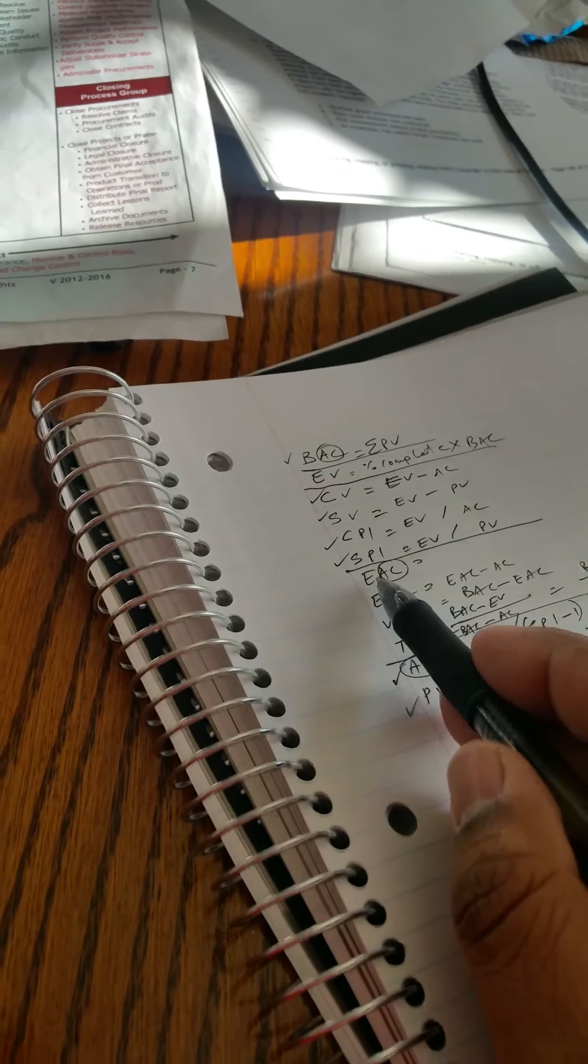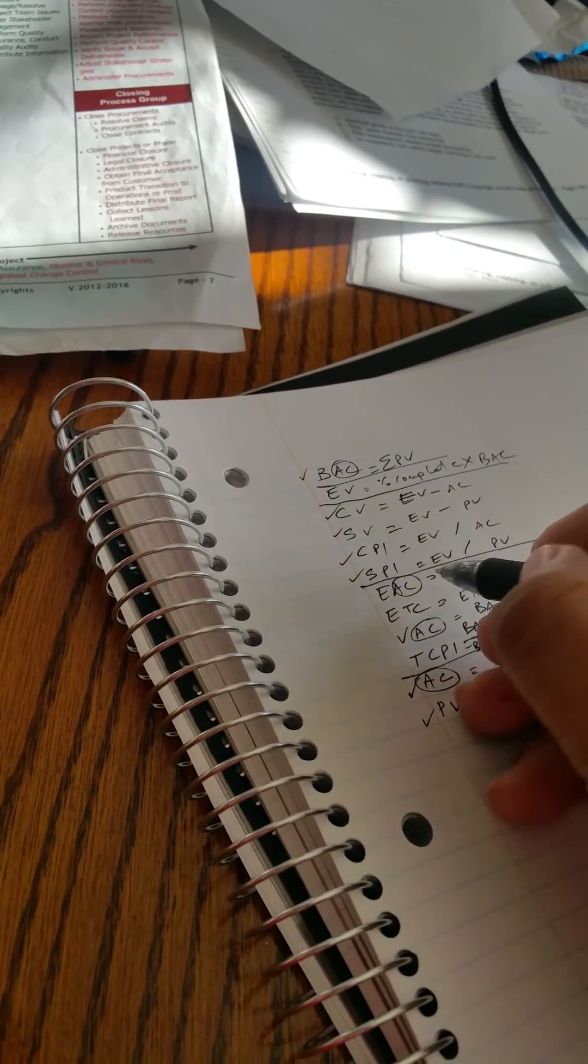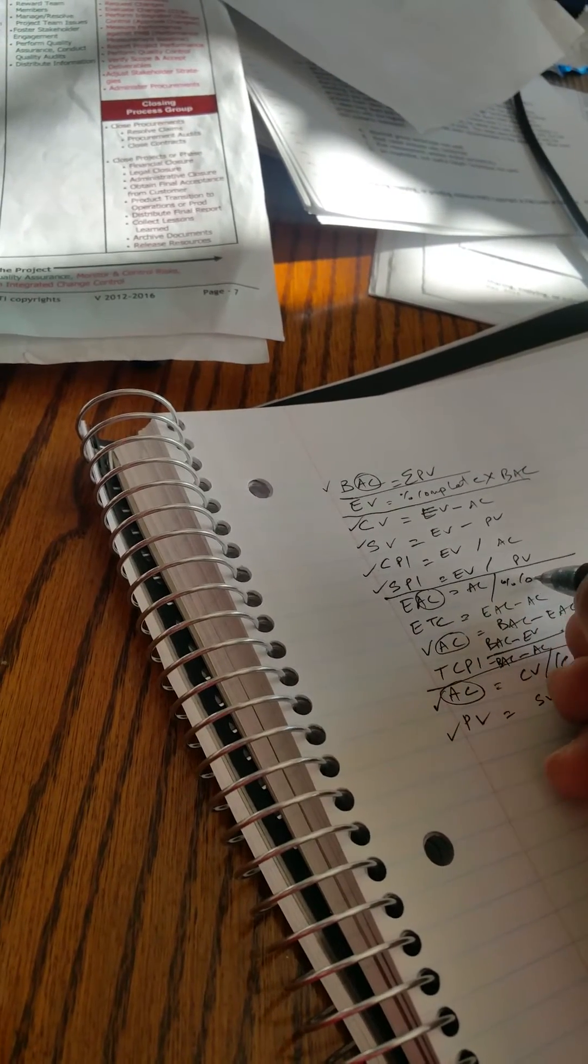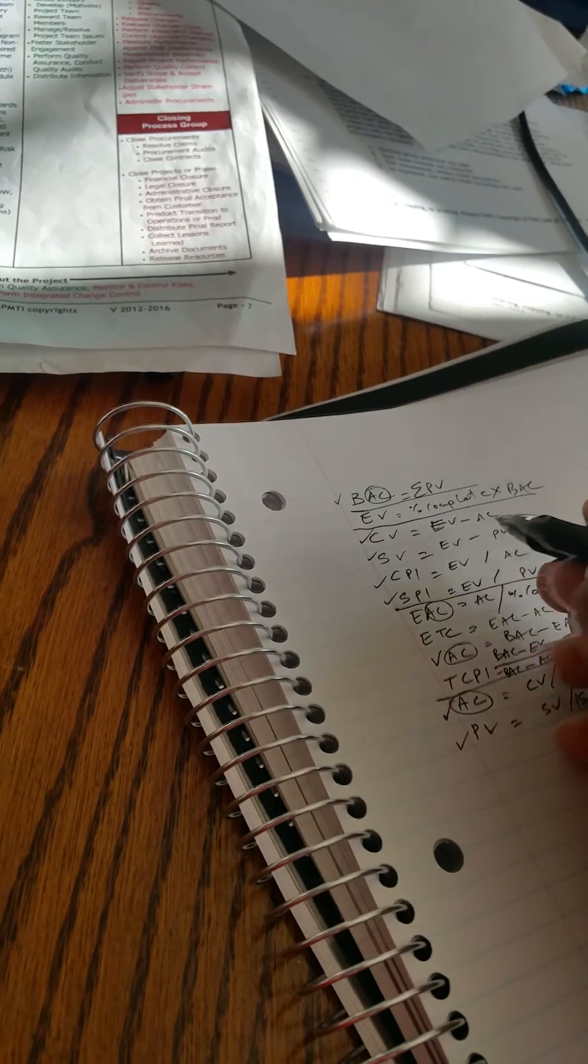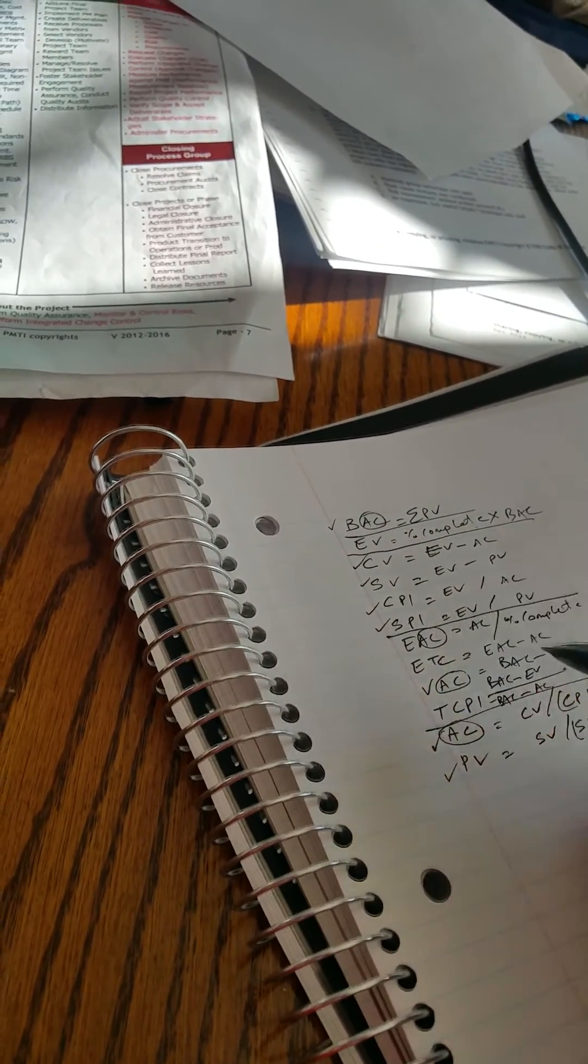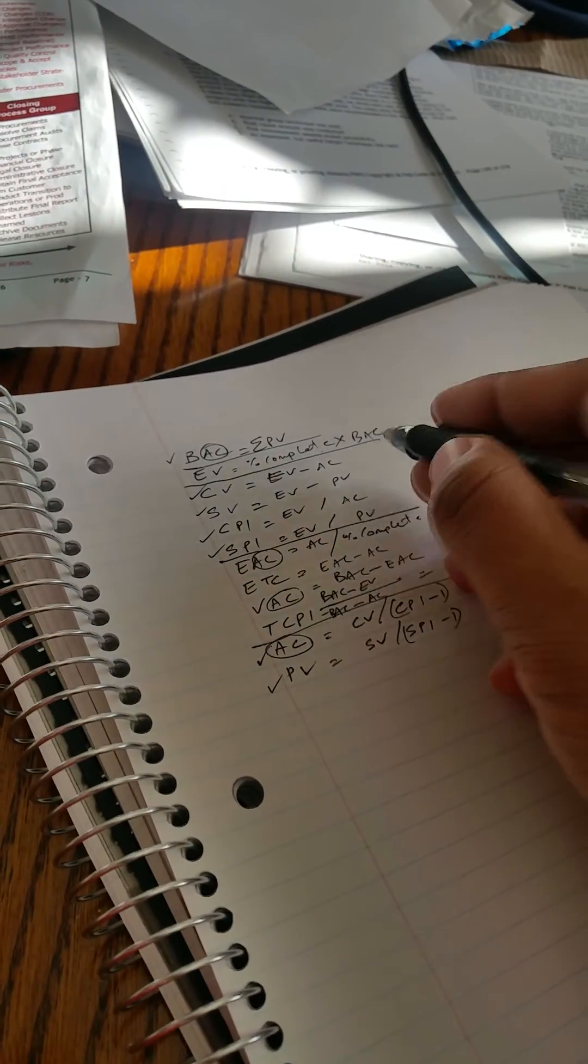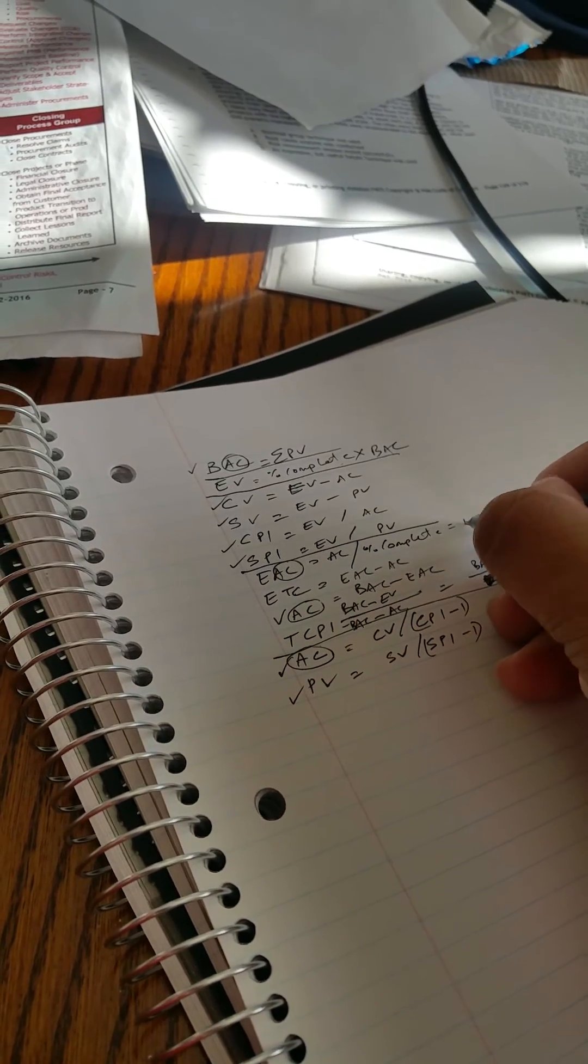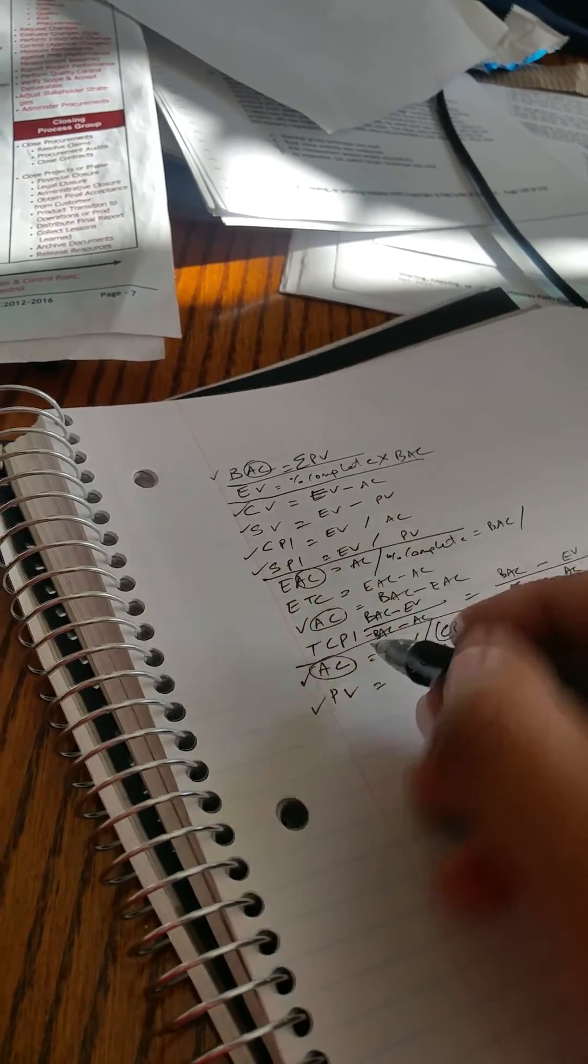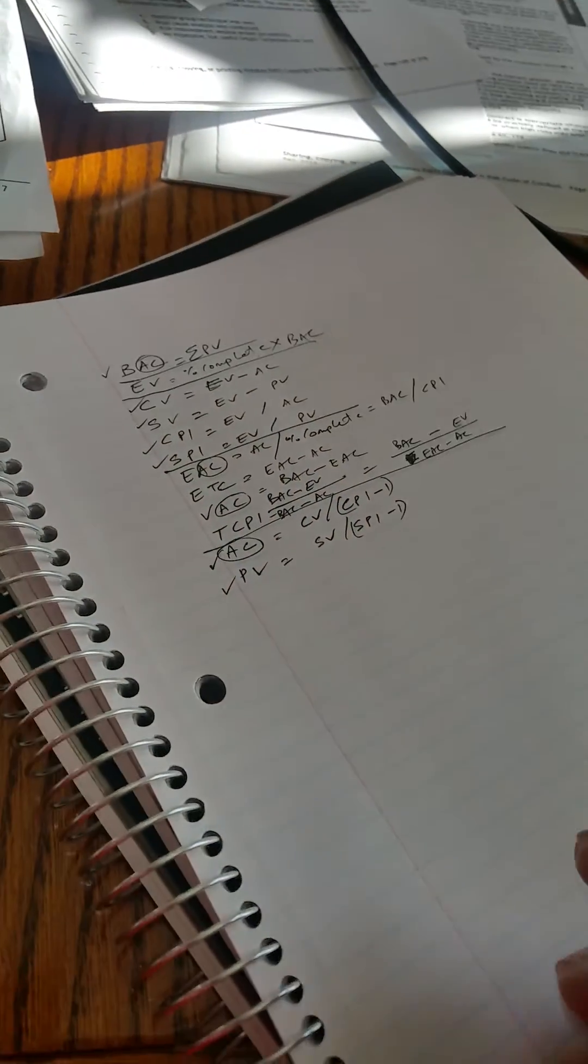Same here, EAC. I'm going to try to, now that I wrote this down, I'm going to try to take the AC divided by percent completion right there. Right there, you know, percent complete, percent complete, AC, AC. So that happens to be the equation for that. And then EAC is also BAC divided by CPI right there.